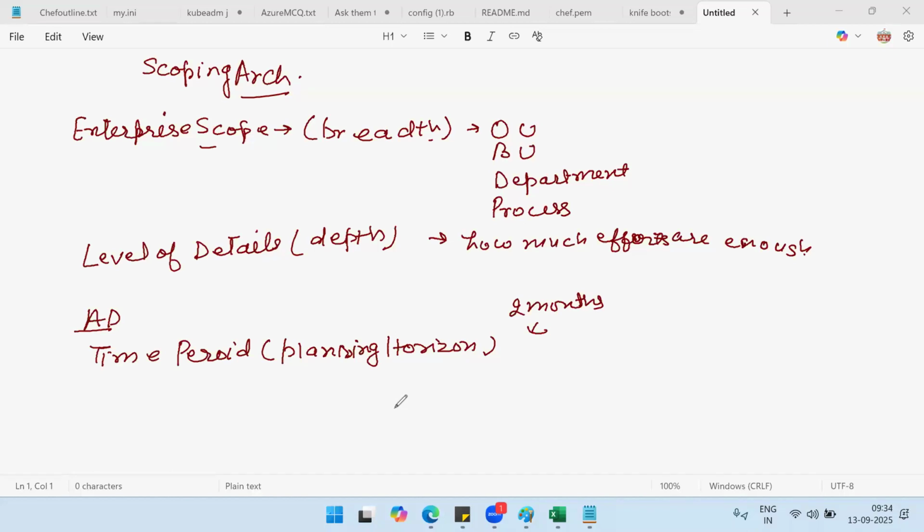Because if you want us to provide, then we will have three third party SMS providers, and if the volume of data is high, we will just distribute it to these three vendors, and they will send it. Or the customer says, no, no, I will provide the SMS. I don't have a budget for it, I have my sister concern, and they can basically provide this facility. Okay, if that's so, in that case your scope is now limited.